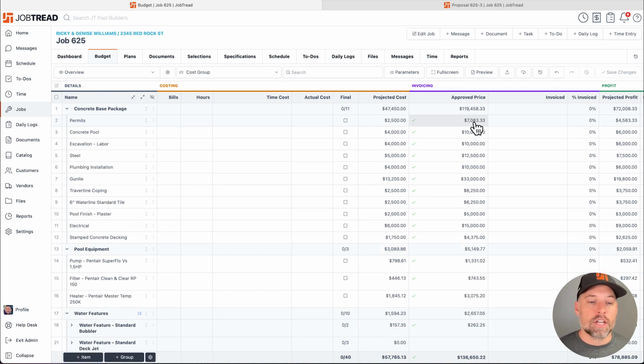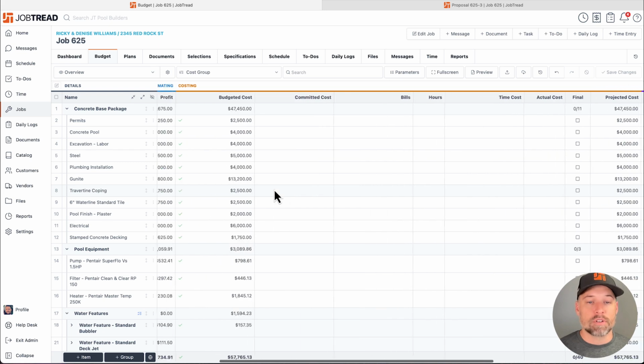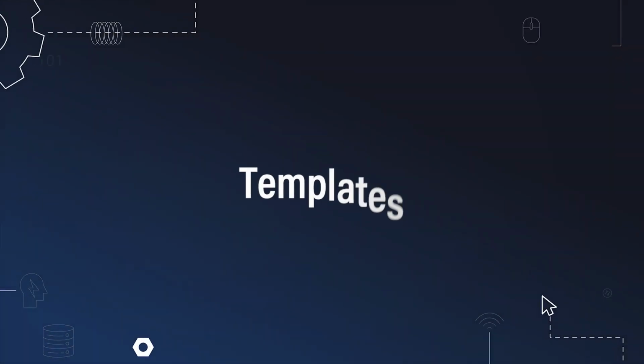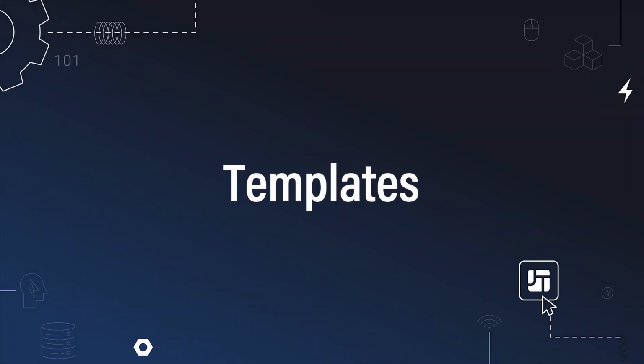So change orders can also be managed by creating a new group at the bottom called, for example, change order number 1, adding the items under that group. Both work. It's just a matter of personal preference. So that's the basic process of plugging your numbers, modifying margins, modifying amounts, and then sending the final version over to the customer for approval.